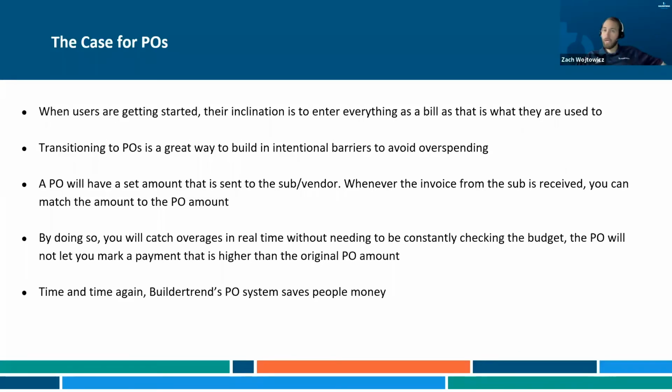The workflow I commonly coach to people is get your estimate in, then go into your estimate, create your POs off of that estimate, and then just wait for your bills to come in and match them to the PO and just see how your subs step. It shows exactly how your subs are actually trying to get as much money as they can out of you. Even if you're using bids to get your numbers, things are going to shift. You need to be on top of that because those things add up.